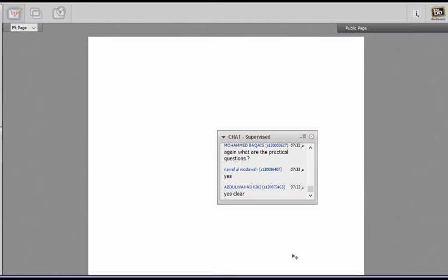So the first short question that can come from this chapter would ask you to describe the processes and the outputs of project scope management knowledge area. If you remember properly, there were 5 processes in project scope management knowledge area. These were collect requirements, define scope, create WBS, verify scope, and control scope, and the outputs are also defined in the book.